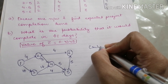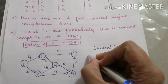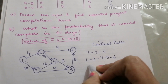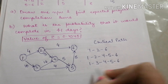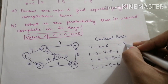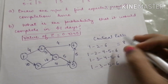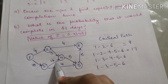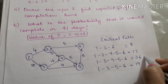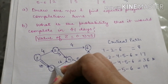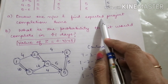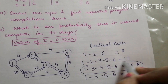Now to find the critical path, node 6 is the last activity. The alternate paths are: path 1-2-6 with length 4+4=8; path 1-2-4-5-6 with length 4+3+5+5=17; path 1-3-4-5-6 with length 10+16+5+5=36; and path 1-3-5-6 with length 10+4+5=19. The maximum time path is 1-3-4-5-6, so this is the critical path. The expected project completion time is 36.